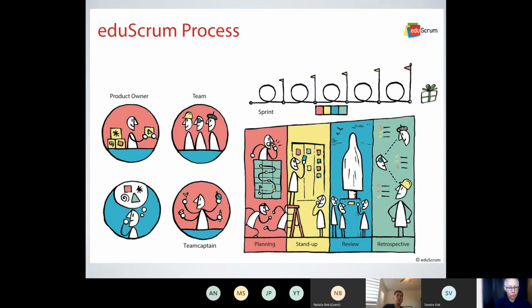time down into sprints. A sprint can be 1 or 2 weeks or a month. It depends on whatever makes the most sense for you. And then you can structure this along the semester. So, for example, a semester could be 16 sprints if you have 1-week sprints and a 16-week semester, or you could have 2-week sprints and then 8 sprints total. It doesn't really matter how you do it. It's just a decision that you can make as an educator.